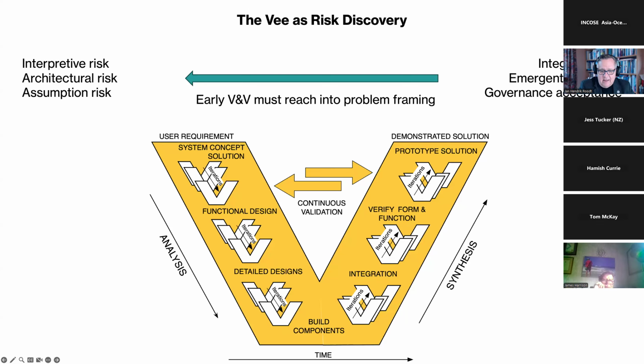And again, the architecture and the functionality often gets fixed very early on when we work on these things, because without fixing that, without having some clear idea on it, we can't do the costing, right? And then that brings us to the assumption risk. What did we take for granted? And often in big infrastructure projects, there are certain things where we have blind spots because of our past experiences in similar projects that might not be directly transferable to the next big one.